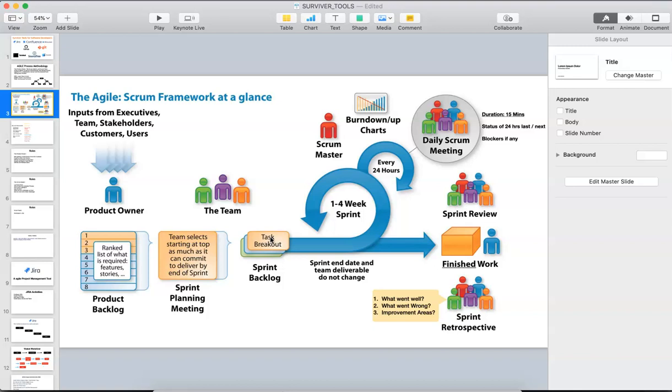Let's say I have 8 backlogs. I choose the first 2 backlogs for the first sprint. That will be assigned to the development team. Again, the backlogs are divided into sub-tasks by the team lead, and those will be assigned to the team members. The development activity starts, and day 1 starts.